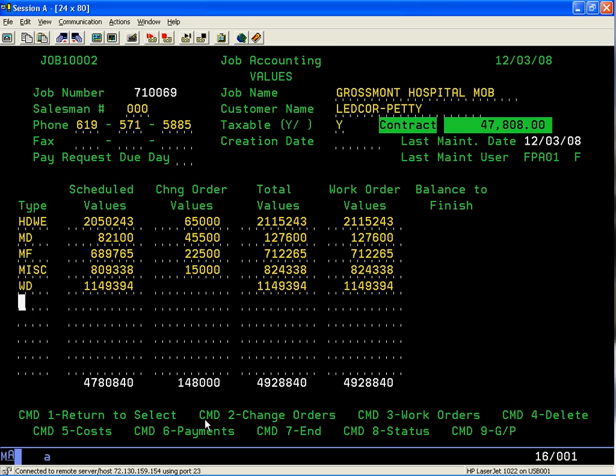This is the schedule of values based on hardware, metal doors, metal frames, miscellaneous—which I use for labor installation—and wood. The types are the types that you've assigned in the estimating module. We've eliminated the decimal point for dollars and cents just to make it easy for data entry.